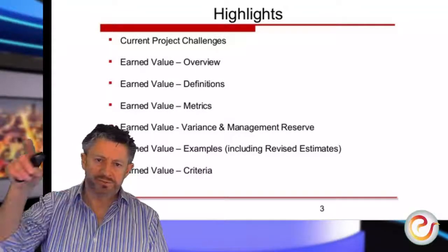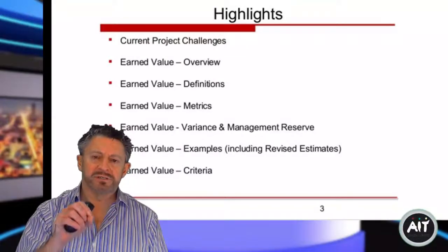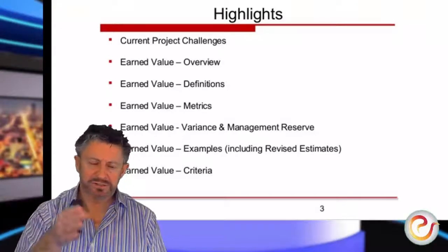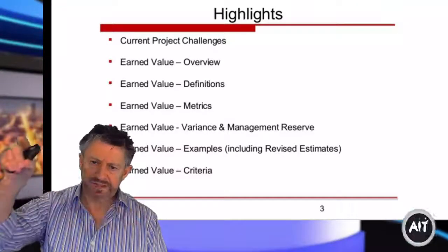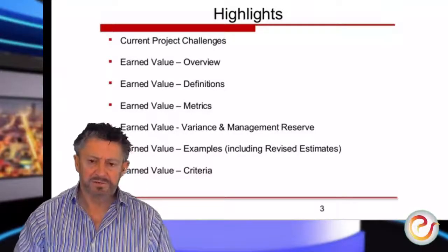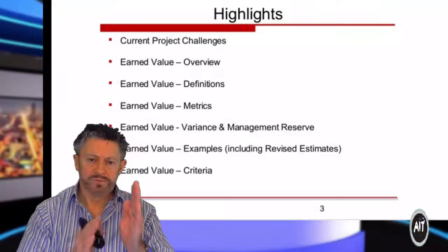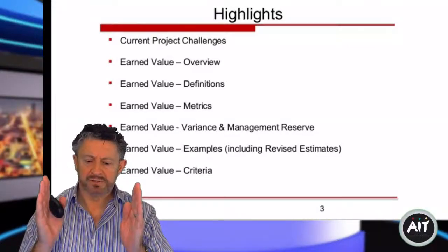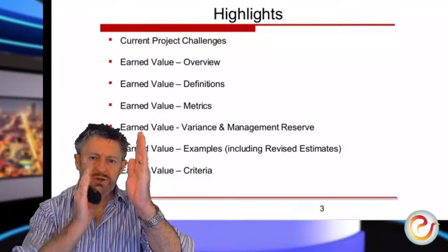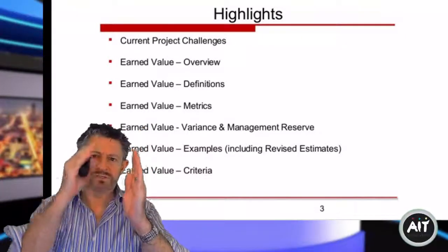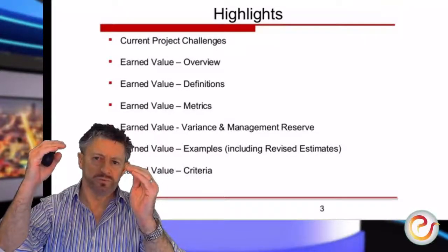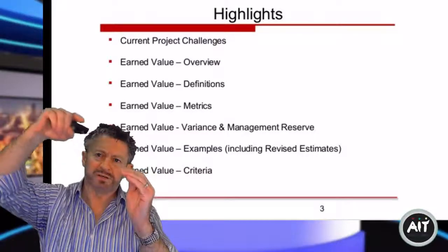I keep drawing this S curve because that's what I say is the baseline plan. When you accumulate all your hours and your activities and your costs, you end up with this S curve. Mathematically, if you have week 1, week 2, and week 3, week 1 is here, week 2 is here, but the cumulative is week 1 plus week 2. So to date you have this amount. Then you add week 3 to weeks 1 and 2, and you begin to get an S curve.